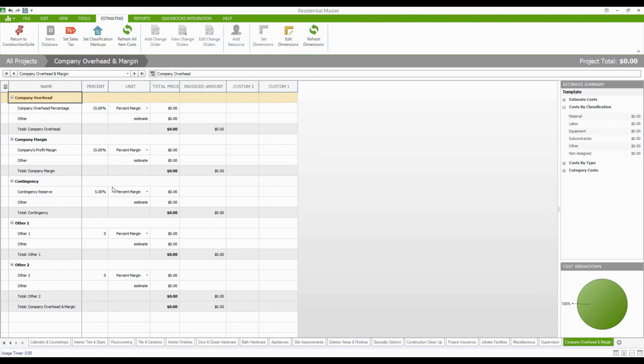And that means that if you're using the percent margin calculation method, 35% of every contract that you sign will be set aside to cover your company's costs and your profit margin. The other 65% of every contract is going to be covering the cost of the contract itself. And that's where that breakup comes in for most of these fixed fee projects.